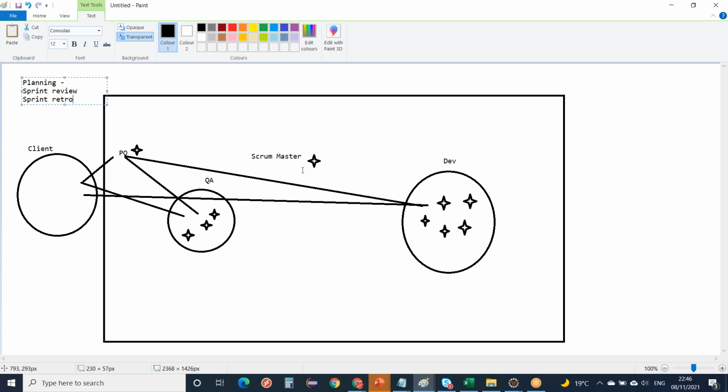So how do we estimate the story point? In this, how complex it is and how much work is there in that. What is the risk, what are the technical challenges or technical needs, and how much time it will take to do that, how we can start or finish, all these things will be considered for the story points. So each story is assigned story points.